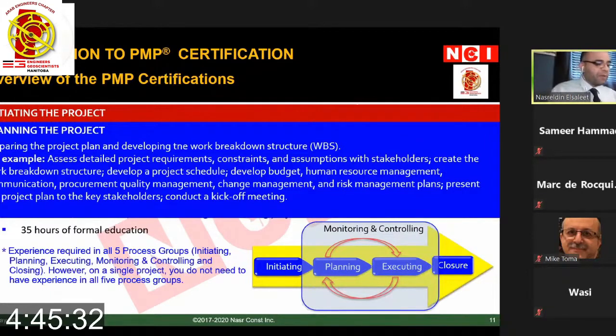When you start doing a project, for example if you are going to build a building, you say, okay, let us plan for the work. We will start with mobilization, getting the design approved. Then we have excavation, foundation work, first floor, second floor, and so on. Then under excavation, you can have forming the level, the footing, the piles, and so on. So you break the work down and create what we call the work breakdown structure. This is for planning.